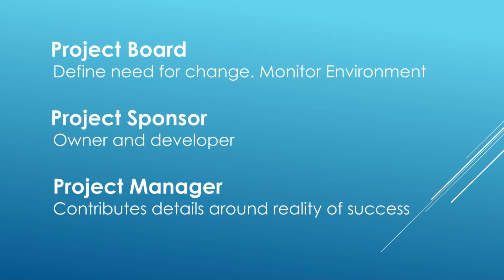So when we look at that project board, remember that their job is to develop the strategic direction for the organization, and ultimately they are the ones who will agree to undertake the project. So their job when it comes to the business case is to define that need for change, to understand the environment within which the organization is operating, and continue to monitor that environment and ensure that the change that is proposed continues to be a benefit to the organization.